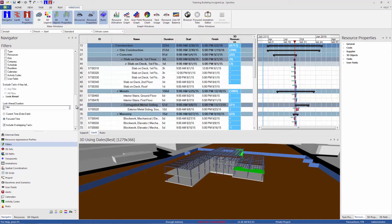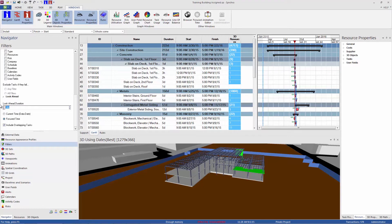So that's the look ahead. You can also, if you like, you can adjust this. It is two weeks, but if you wanted to change it to three weeks, go ahead and enter 21 days, and that would update.